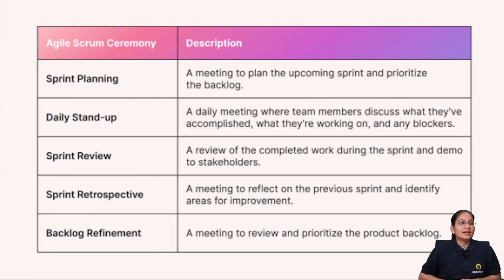The daily stand-up is a meeting where team members discuss what they have accomplished, what they're working on, and if there are any blockers. So this is a quick daily meeting where everything is discussed based on what they have worked on. Daily stand-ups keep everyone aligned and allow the team to address issues early. It's a simple but powerful practice that helps the team stay focused and on track throughout the sprint.